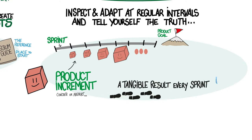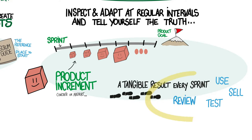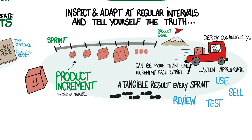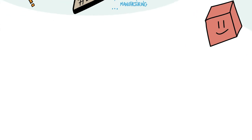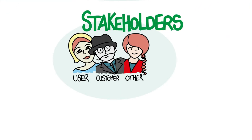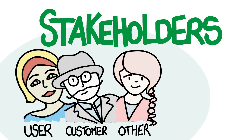Each sprint produces a tangible result that supports the overall goal — something you can use, something you could sell, something you can test in real life, and most importantly something the scrum team can review together with its stakeholders. The idea is to produce tangible results every sprint. You can produce increments more often, even deploy them continuously, if that makes sense and if your team has the technical excellence to do so.